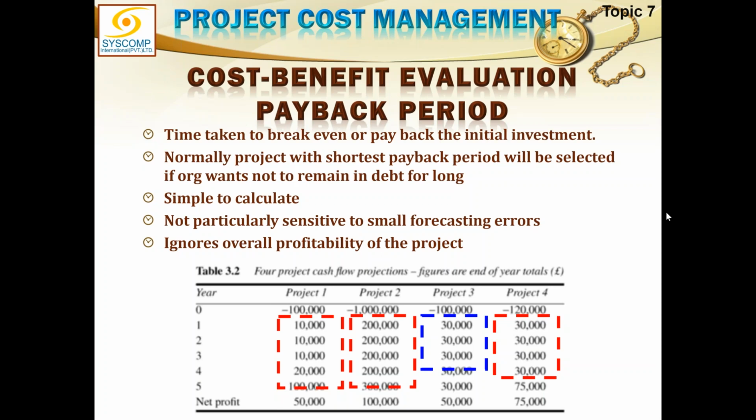Of course it is. But naturally, if I do not have to recover the money soon, if I am not worried about recovering the money soon, then maybe I can look for long-term benefits. But if I have to pay back the loan, then it is not important for me whether this project is good in the long term or not. I just want it to be giving me as much money as soon as possible, so that I can pay back the loan and then I own the business. Right? So this is the only situation where payback period is used. But this is naturally a very important factor why we should be using this method.